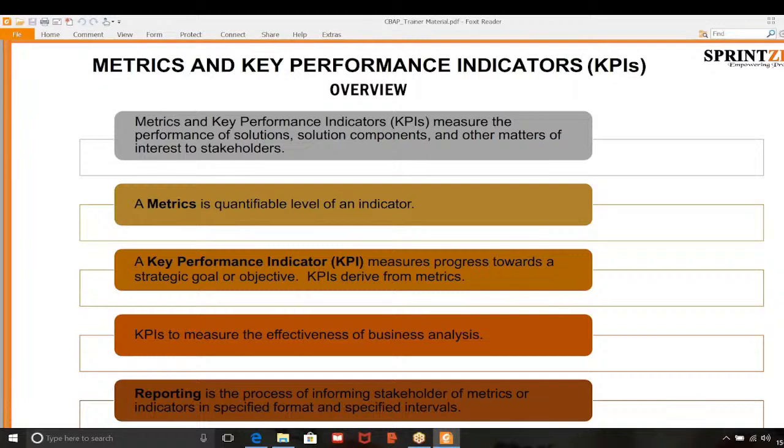They have been resolving 180 to 200 work items each month. They have a target of improving by 10%. If they can reach a target of 220, that means their target will be achieved.